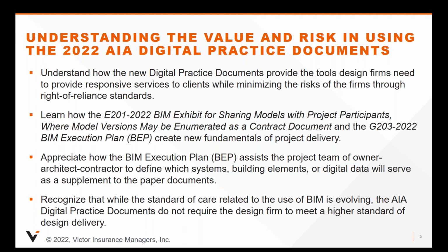I want to make sure that you learn about one of the more prominent changes in the new set of digital practice documents. And that is that for the first time, the documents recognize that there is an increasing and reasonable demand by project clients that some portion of the digital documents be included in a set of information provided to a construction contractor as a contractual obligation for the contractor. The E201 exhibit allows model versions to be part of the contract documents.